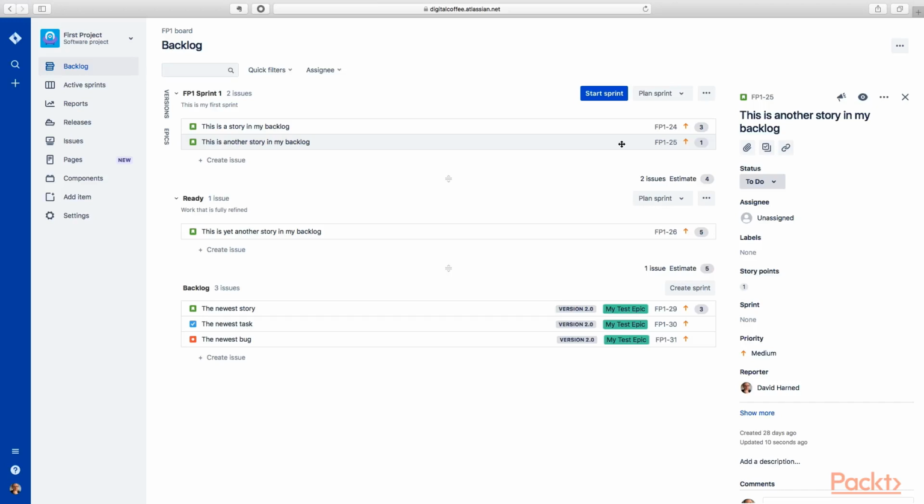Usually the way you're going to want to know this is you're going to try and get a group commitment on your first sprint. And then in your second sprint, you'll do the same thing based on your output from your first sprint. Now, the number of story points that you complete in your sprint is called your velocity. All right, so you use the velocity from your previous sprint to help you determine the next sprint. Were we able to complete it? Yes or no? And then adjust accordingly.